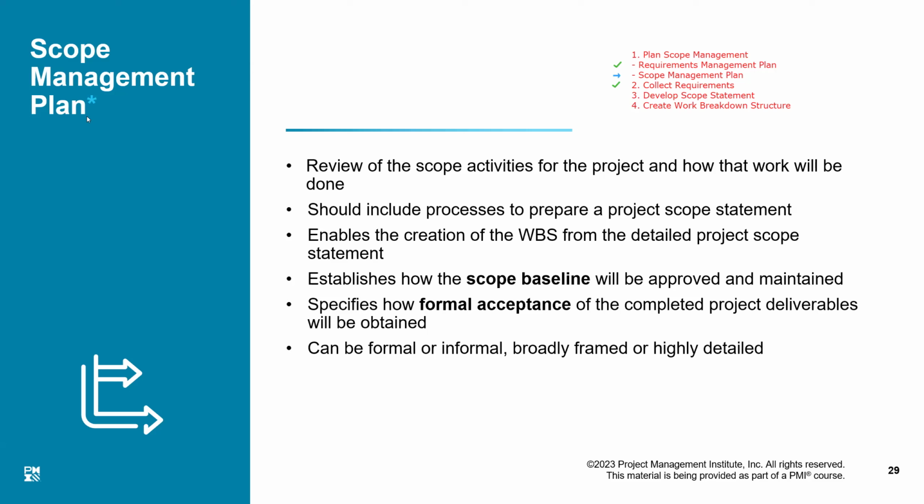Remember, we are not talking about the requirement management plan, which we have done already. We are only talking about the scope management plan. It gives us a description of how to develop the scope statement and how to create the work breakdown structure. And once all the planning processes of scope are completed, that is the point when we have to baseline the scope.